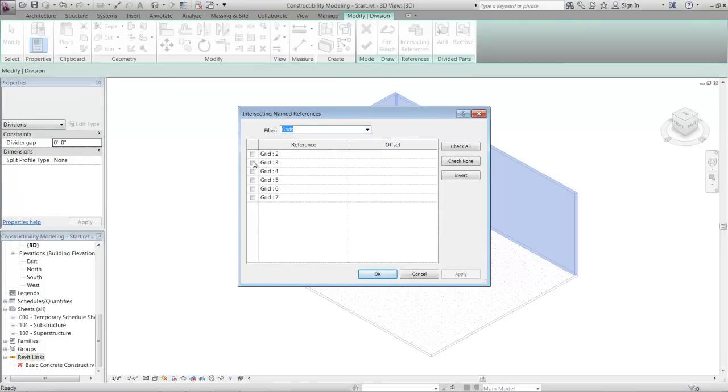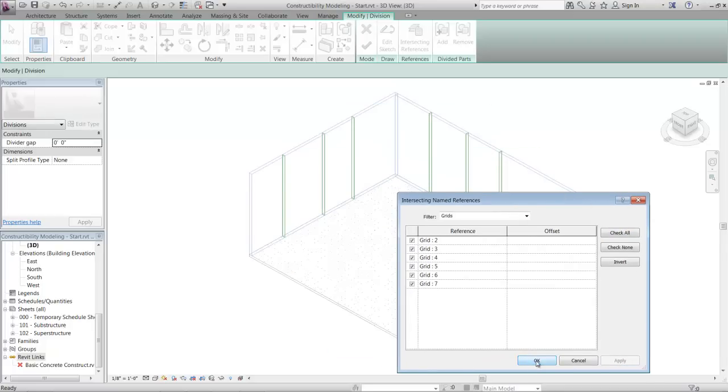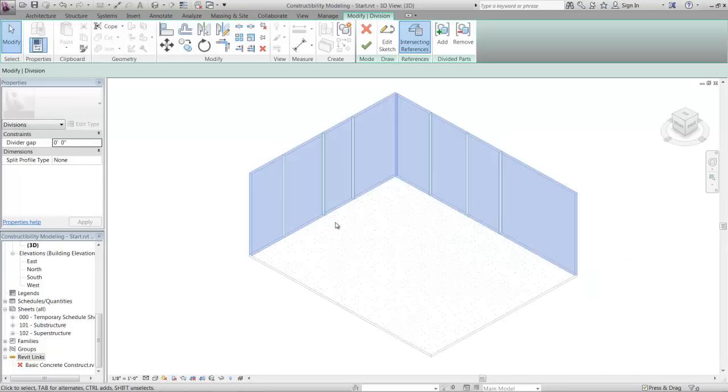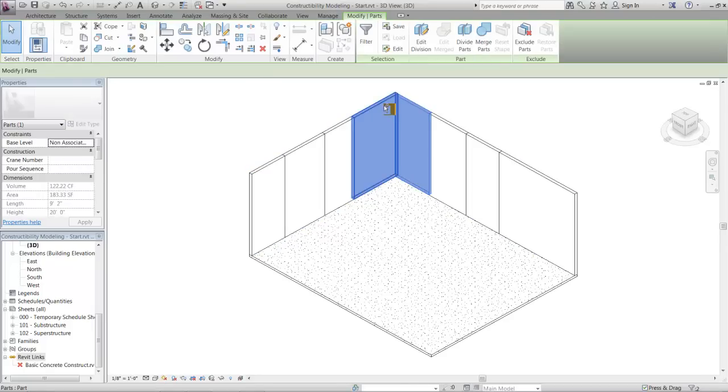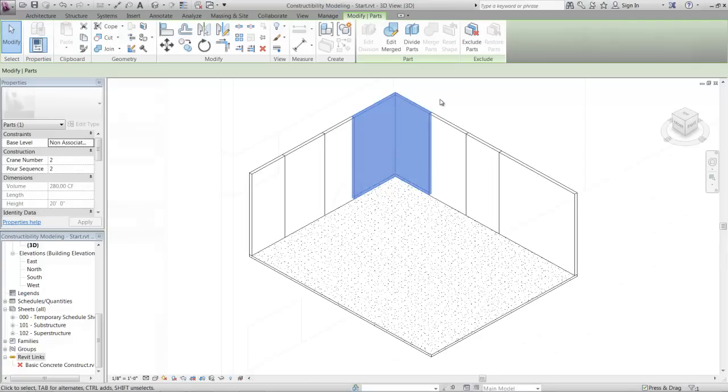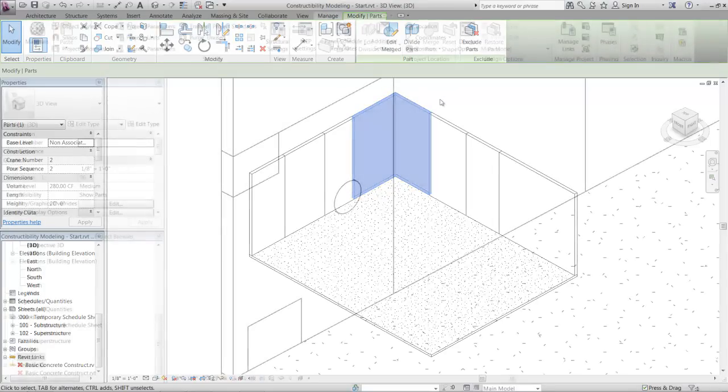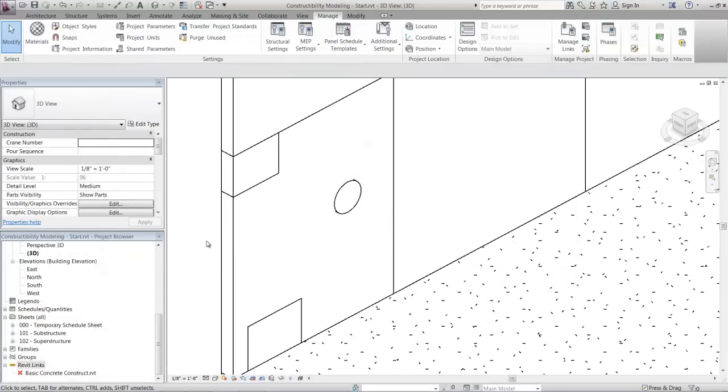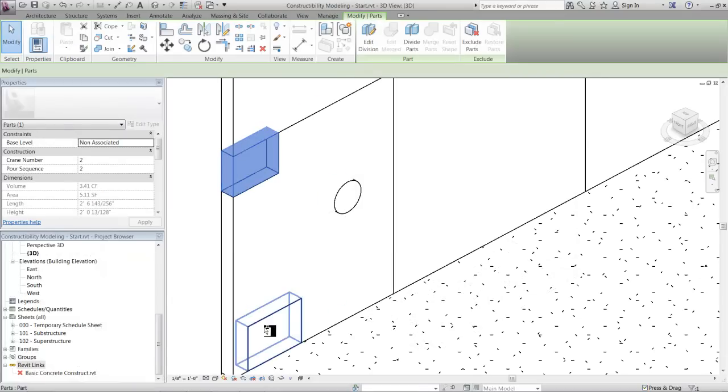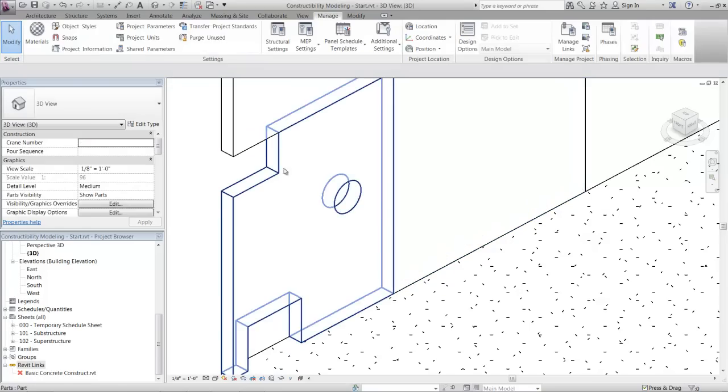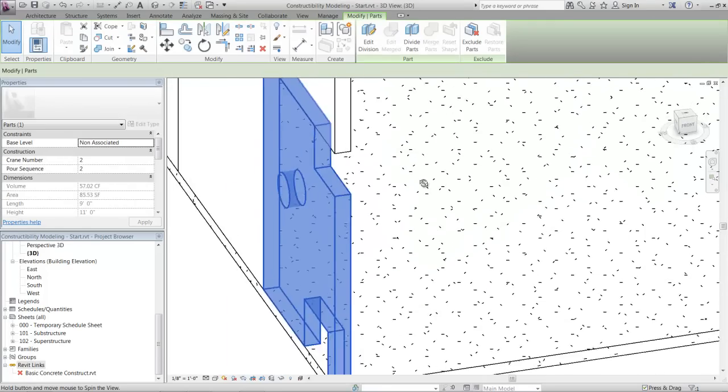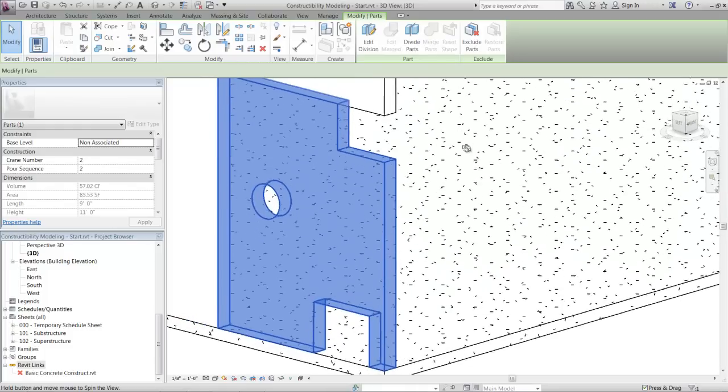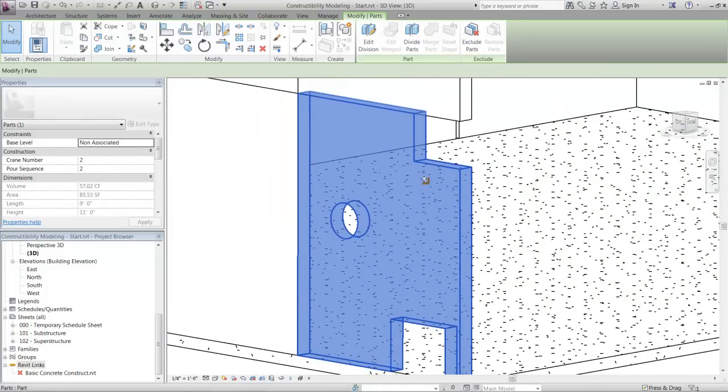Something that can limit the usefulness of a model is a lack of construction detail. Take this wall created by an architect. In this example, the wall is modeled as a single object with property information describing the components it is comprised of. From an architect's perspective, a single object may be an adequate representation. However, for a contractor, you may need to understand and investigate the order in which each sub-assembly is built, along with relevant impact on the surrounding trades or logistical equipment.